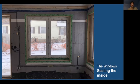There are definitely times when, if you're not there, it's not a good plan to have that membrane not being monitored, because the easiest way to catapult a disaster is when someone with a utility knife is loose and accidentally cuts the membrane on the ceiling, or in other projects on the walls. So really staying on top of the crews is easy to do when you're sticking around on the site. We got the conduit in and then spray foamed to fill that cavity back in afterwards.